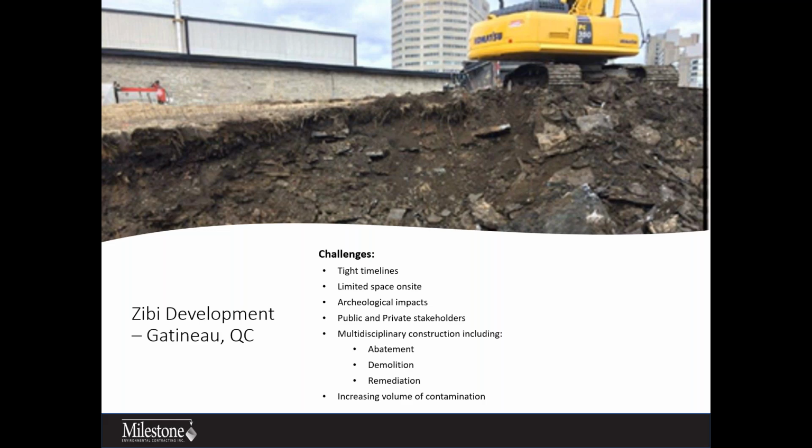The remediations on this property included excavation, segregation, screening and transport, and disposal of over 100,000 tons of non-hazardous soil, hazardous materials abatement and demolition of former industrial facilities, removal of temporary roads and restoration of permanent site access, installation and reporting of environmental controls and site security measures, controlled breaking, removal and disposal of hydrocarbon impacted bedrock, import, placing and compacting granular backfill, monitoring and tracking and implementing dust control measures. Shoring was also required inside and adjacent to building foundations during excavation.